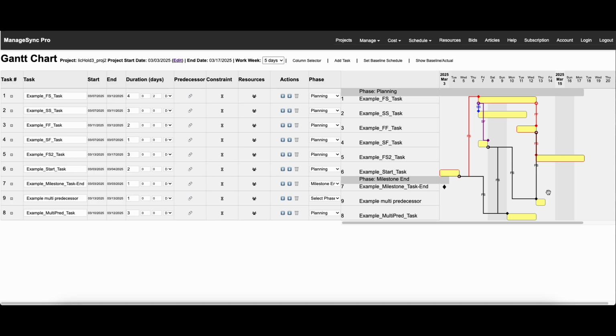Now you'll notice something. This is a little different than most Gantt charts that you see. This just is a little more clear to me. I am an engineer, so I like things to be very precise, very exact, and very clear. A lot of times you'll see arrows going into the middle of bars. And I like to just distinguish it a little bit to make it more scannable, more discernible. Coming out of the predecessor, it's a circle at the bottom right-hand corner of the bar, and then it comes down to the dependent bar, and it enters at the top left corner, and it's a diamond.